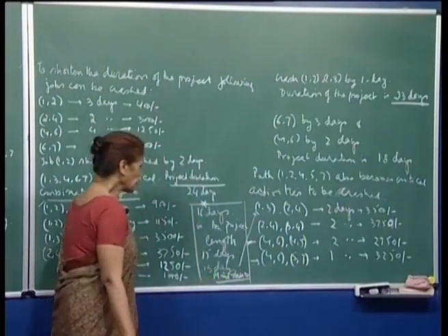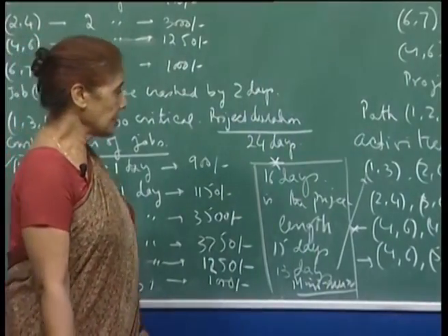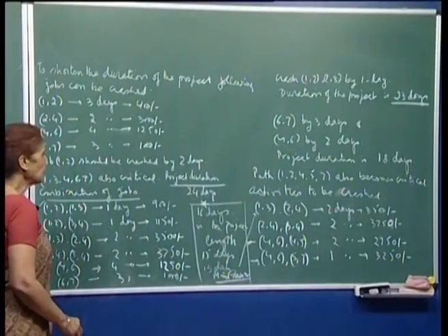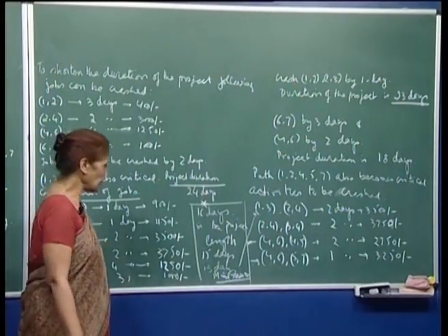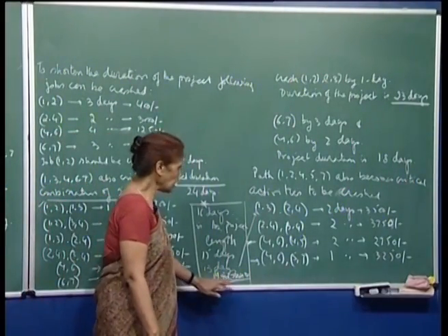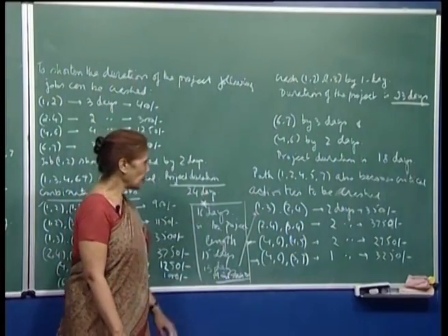This is your minimum duration, and after this, sit down and see for yourself that you cannot crash the activities any further, even if you want to increase the cost.